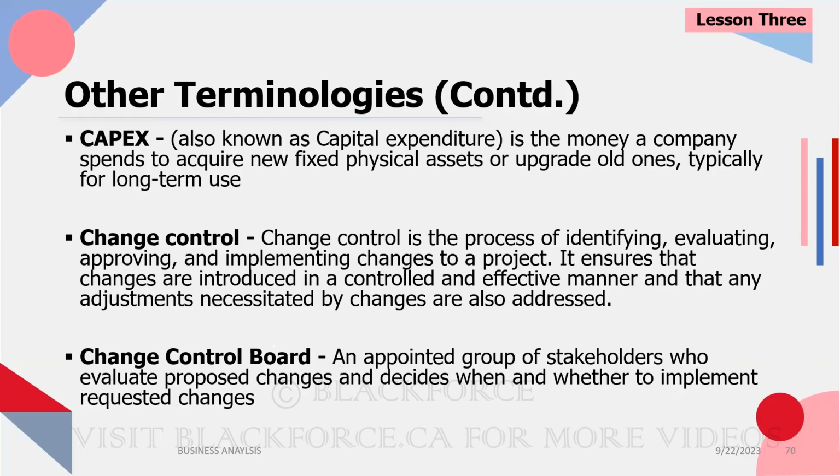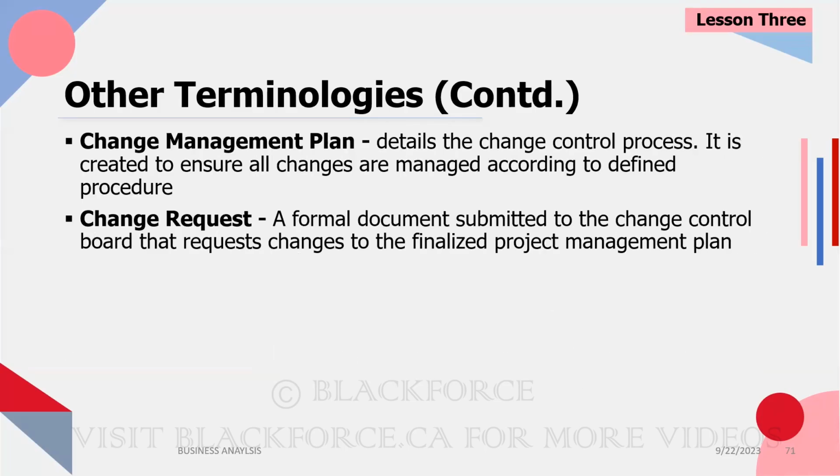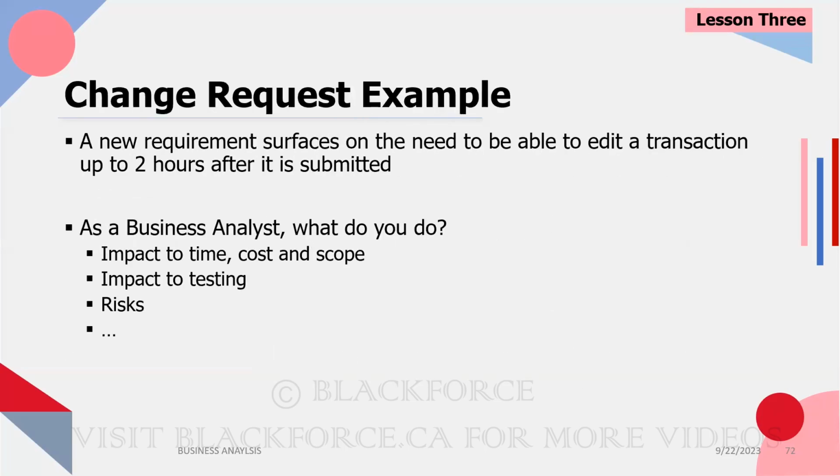We talked about CAPEX, which is just for you to know. Your change control process, you need to be aware. You do not lead it. You are just a facilitator. Somebody has a change, give them the right document to fill, submit it to the right person, and then get feedback from the parties making the decision and communicate it back to the person who requested the change. Okay? So this is the change process, right?